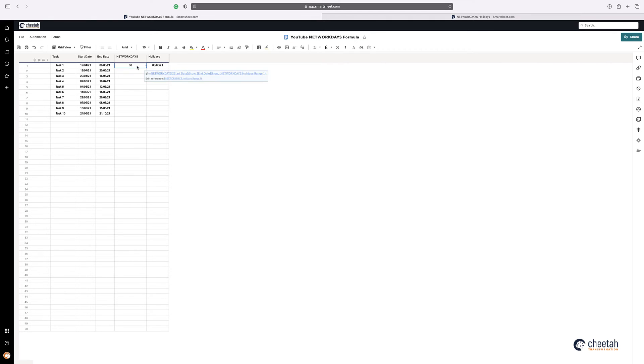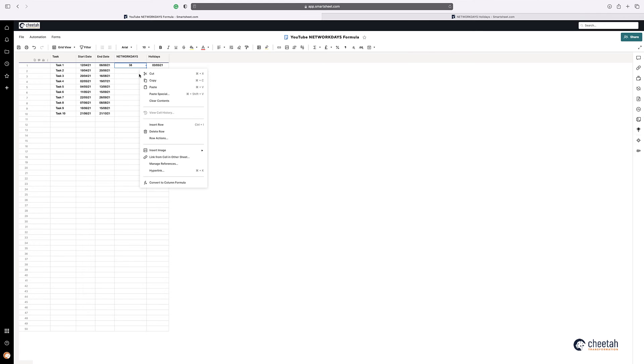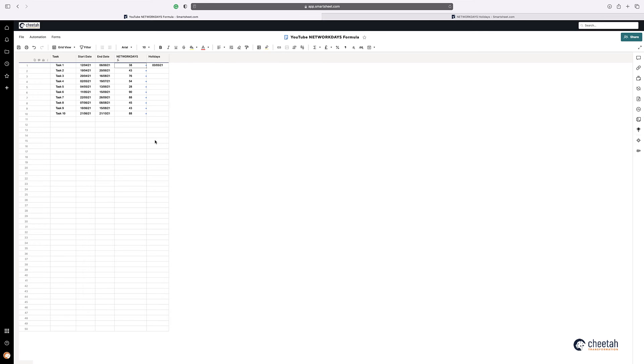So if we just then make that a column formula, you can see that we've now calculated the number of working days between these two dates, taking into consideration any holidays that you've identified.